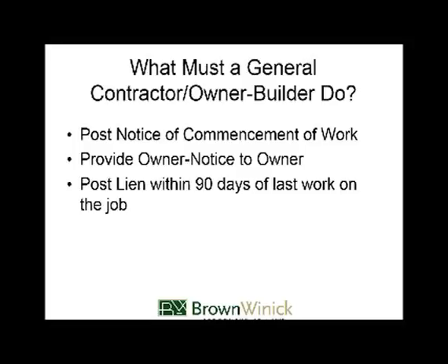If you're a general contractor or an owner builder, you're the next step down. What do you need to do? There are 3 things you need to do to help protect yourself under these new rules. I got these a little bit out of order, but you should provide the owner notice to the owner. That's the first notice we talked about. It's the first thing you need to do.